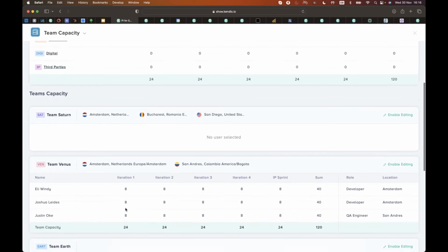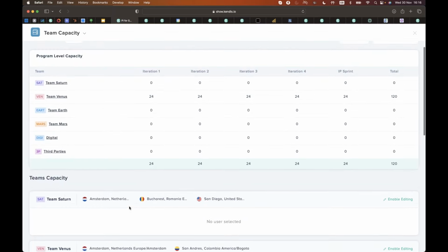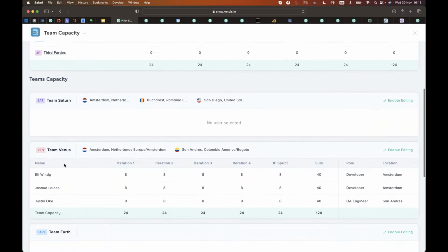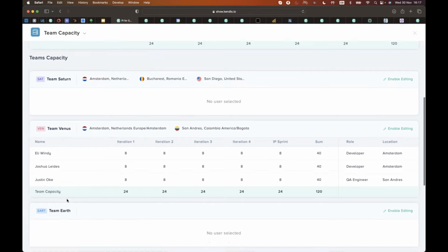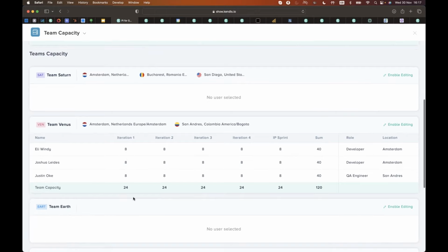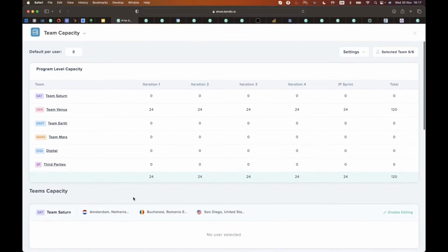It could be that you already know as a team that everybody does, I don't know, 50 story points per sprint. That's fine, you just put 50 story points per sprint if you want to. Or you could see this example here where you can list the individuals down and then automatically they'll be assigned story points. But this is all done anyway during the PI planning. But certainly list the individuals down on your team if this is the way that you're going to calculate their story points. So you can get this area ready.